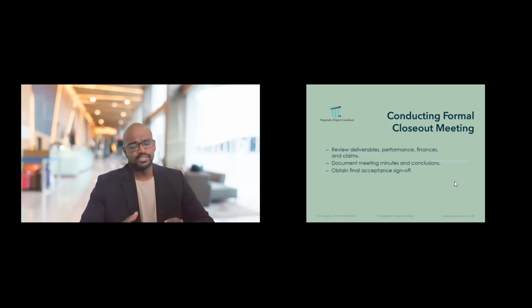Next is the closeout meeting. So review the deliverables and performances, finance and claims on a very high level. Document the meeting minutes and conclusions so that it has a smooth closure from all the stakeholders. Obtain financial acceptance, sign off. So update the lessons learned record.